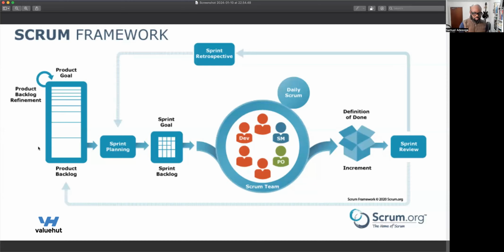So the sprint goal, the items selected, and the plan for converting those items into an increment is what formulates the sprint backlog. And then the sprint starts. On every day of the sprint, the developers would converge in an event called the Daily Scrum to inspect their progress towards the sprint goal and also create a plan for the next 24 hours.